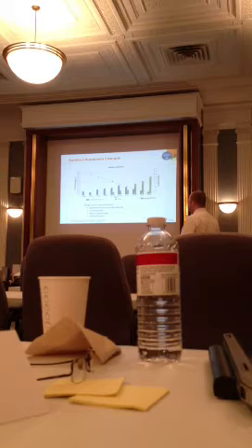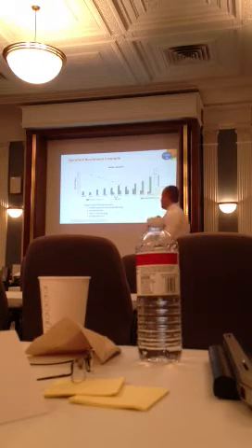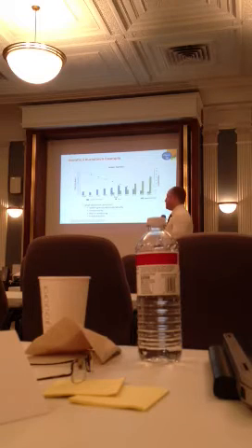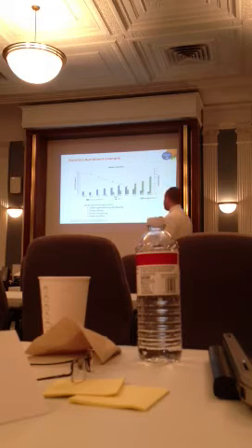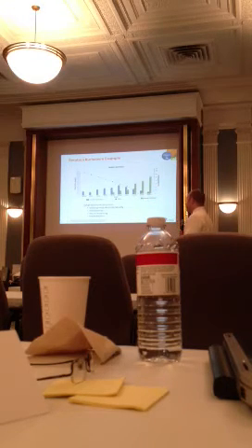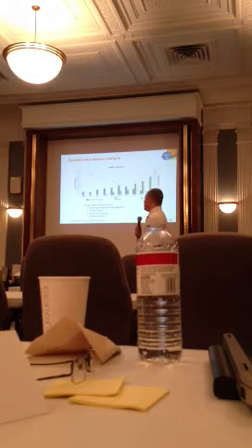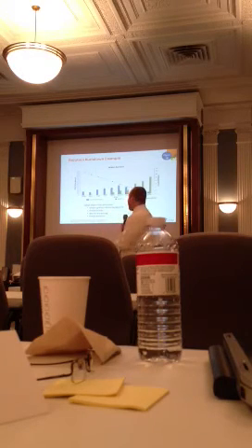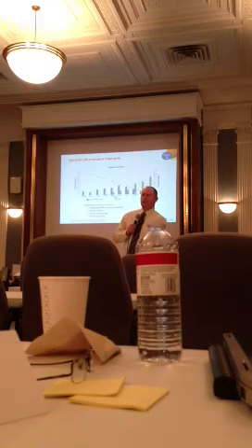So if you look at this, we delivered 340 hours worth of tasks. Okay? And we committed to 78 story points in this iteration, which was May of like 2 years ago. What is today? Yeah, like a year and 8 months ago. Okay? So, my first question to you guys is on the first day, day 1 of the iteration, we only had 50 hours worth of tasks broken down out of the 340 hours worth of tasks that we ultimately delivered. Good or bad?